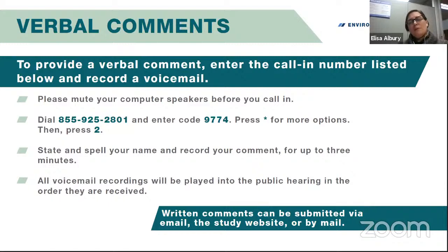As part of the UDOT noise policy, we have a couple different criteria that we use to determine whether we would actually propose to build a wall. The first is whether a wall is what we call feasible. We look at engineering feasibility. In other words, can we build it? Is it safe? Those types of things. And then we move into a criteria we call acoustic feasibility. In other words, from a noise standpoint, is it feasible? For walls that range between 6 and 14 feet, we found that those were all acoustically feasible, that they would provide a 5 decibel reduction for the impacted noise receptors in that area.